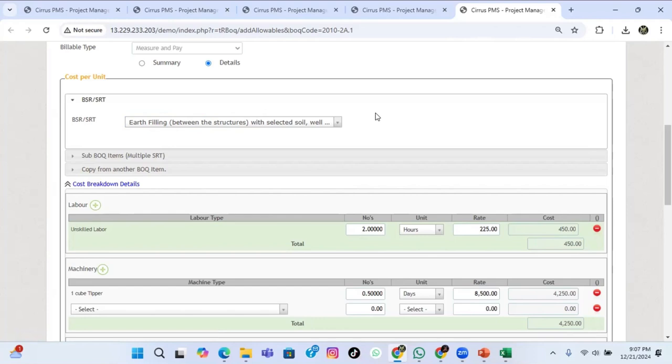That is editable. Anytime you can change it. Whenever you get more details, you can edit and update the system. After that point, it will be available for everybody. For the tendering stage, we don't have much detail. Sometimes we need to get all the details from the subcontractor, but since we don't have time, we put a figure with our gut feeling. But when we start the work, we need to detail it and see whether our cost is correct.